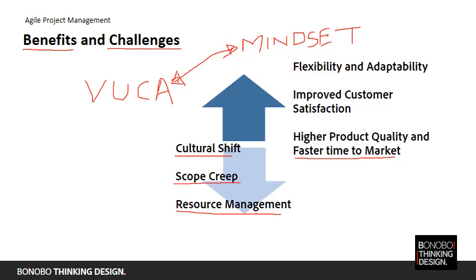Trello is a web-based project management collaboration tool that uses boards like a Kanban board, right? So the things which you're going to do, which you're doing, and which are done. Those are the primary attributes of a Kanban board, which helps you track the activities, primarily from the perspective of how much work is in the backlog and how much work has really been done. So the focus is to move your task as fast as you can to the done basket. Right, and then the third one is Asana.